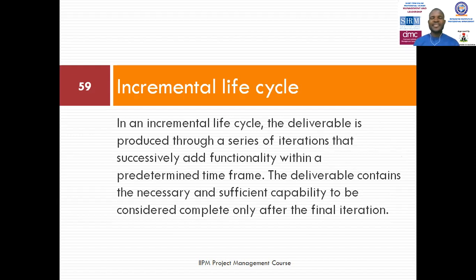But in the case of incremental, we are actually running a series of iterations, but in this case, we are adding it based on a predetermined time frame. In the iterative, we don't really have a predetermined time frame, but in the incremental, we already have a predetermined time frame that we are working with.